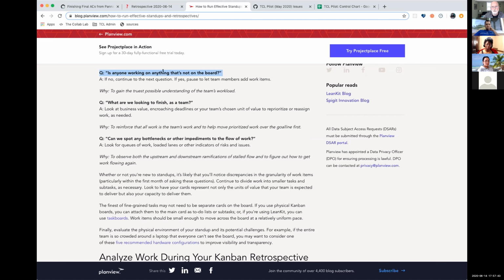And a spike is generally where there are a bunch of unknowns, or there's kind of unknown scope, or we're not sure how we'd solve this thing. So what you do is you time box an investigation into that thing and try to learn what you can about it and uncover the unknowns, so that you can then have a discussion about what the actual scope of the fix or the improvement is. So maybe the thing to do is to put a spike on the board.